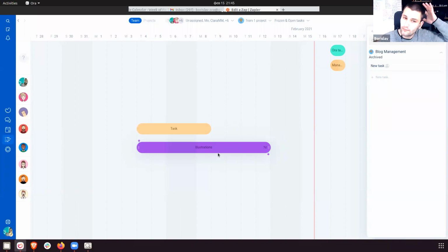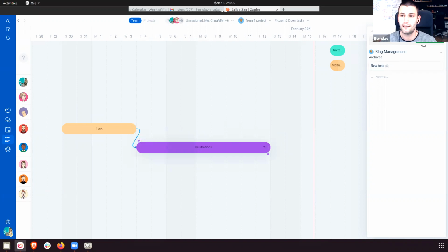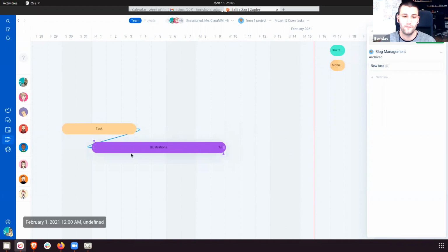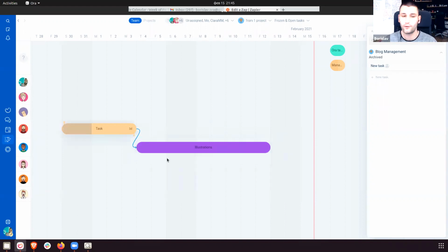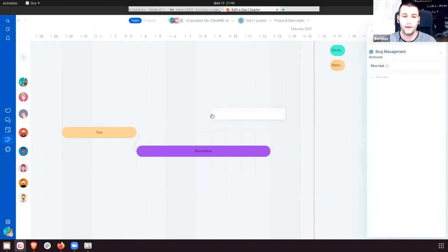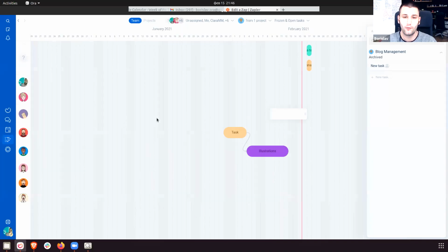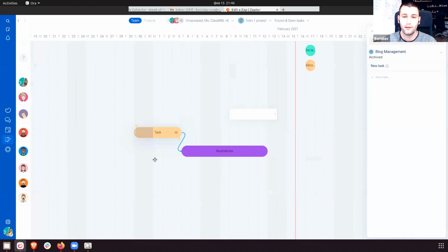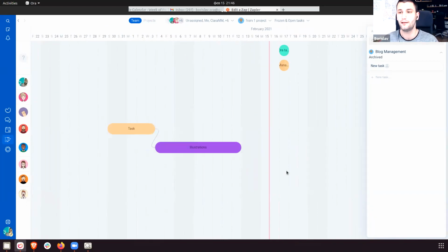Can you show the task relationships there? The task relationships, yes. Task relationships can be created here as well. Just do this, and the tasks are now linked. So, for example, if it's like this, I see that something is wrong here because this task is blocked by this one, and maybe I'll have to reschedule for the project to go well. Okay. What else can you have? Here we can zoom out and zoom in with control and your mouse wheel. Here you can also create tasks and etc. Okay, maybe this was everything for our demos.